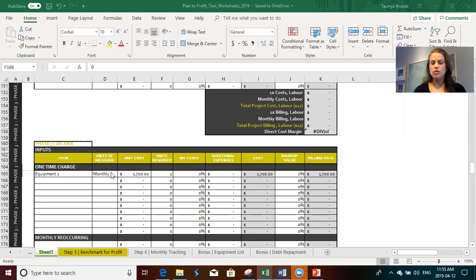I thought I had to do it by hour, but sometimes I wouldn't, because you've got to think again about your equipment. If you can't rent it out the hour after that, then that piece of equipment is attached to that project for however long it's going to be. The whole duration, yeah. There you go. And if it's monthly, then I would just put in the monthly piece, because you might not be getting it back over the weekends. Well, it sits on the weekend.